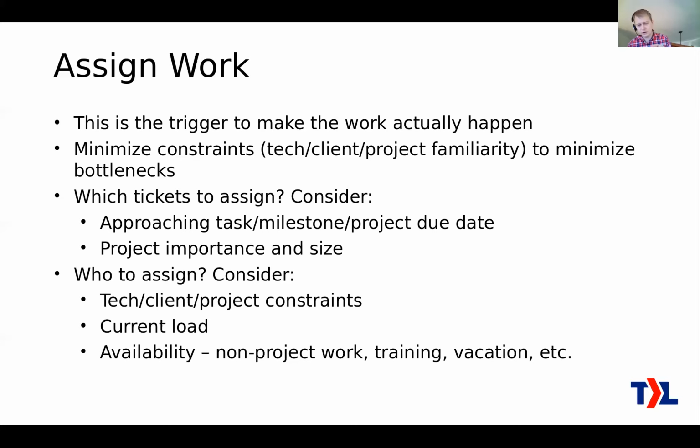And then who to assign it to. Okay, basically, your technician, your engineer, who's familiar with what technology. Also, who's familiar with which clients and which projects and whatnot. That's going to affect who you can assign those tickets to. Also, their current load, like I mentioned, if you do have a senior engineer who's got a lot of the work, then you're going to have to assign it to somebody else, hopefully. And then just general availability, like non-project work, trainings and vacations and so on. Hopefully, for those of us in the Northern Hemisphere, you're getting into summer, so hopefully you're thinking about that already with your project stuff.